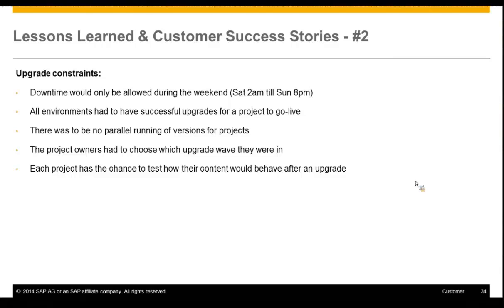And then the one good thing was that the project owners had to choose which upgrade they were in, right? They listed all the projects based on the business importance, based on the priority. They decided which project will go in wave 1 versus wave 2, and so on.